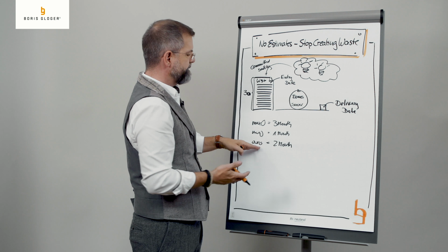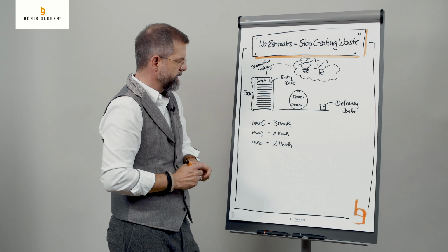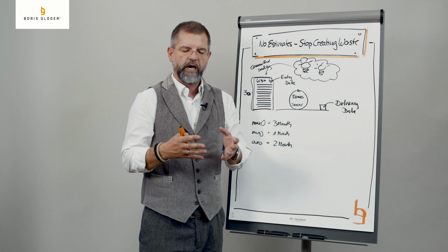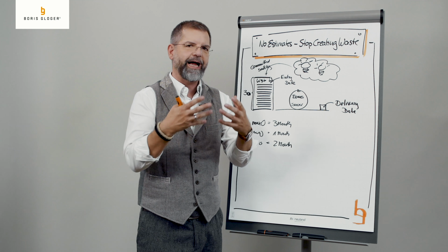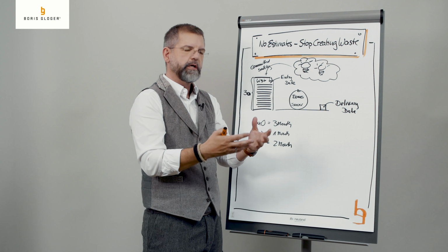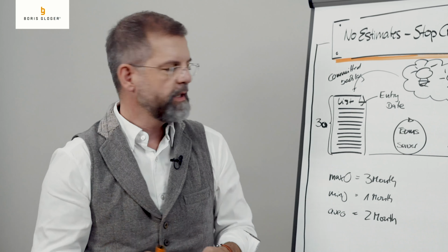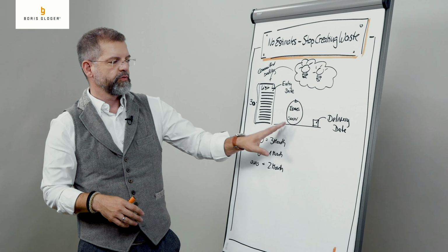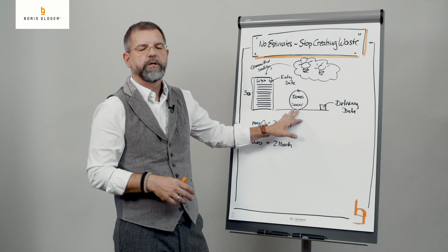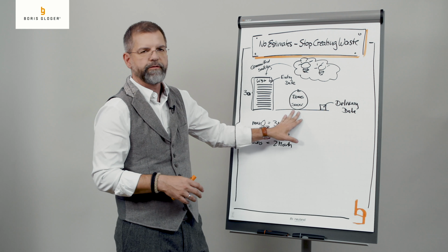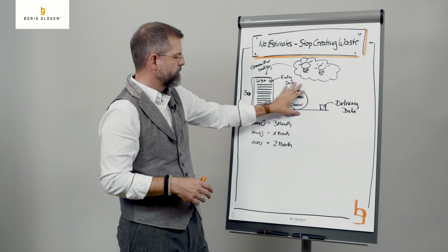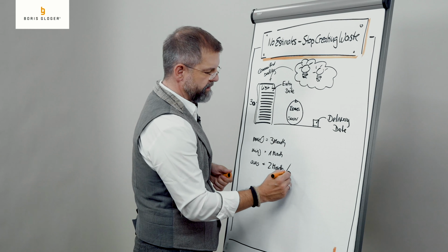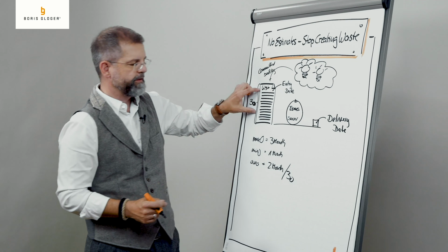If we keep it this way, then we can create an average cycle time. And now we know how much an average item costs in our organization, because we only need to identify how much a team costs, or the server, the work costs in these 2 months, and divide that by 30, because on average we always had 30 items in.